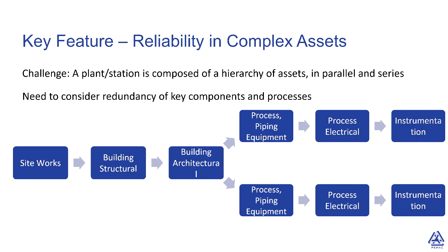And what I'm showing here is that any building would have components like the site works, the structure, the architectural elements. And then we would have process elements that could run in parallel. We might have redundancies. We might have 3 or 4 pumps, and we keep one offline. So our probability of failure considers all of this. We look at a redundancy analysis, and that overall probability of failure of any given project is doing this kind of series versus parallel analysis.